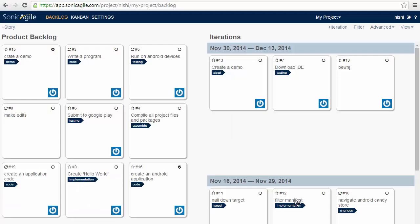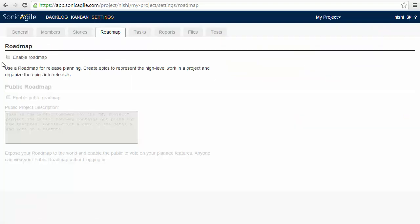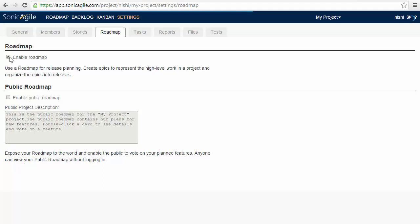The next very interesting feature of SonicAgile is Epics and Releases. The SonicAgile Roadmaps enable you to release planning by creating Epics and Releases. This is also an optional feature so to enable roadmap we need to go to settings and then roadmaps and this is how we can enable roadmaps.